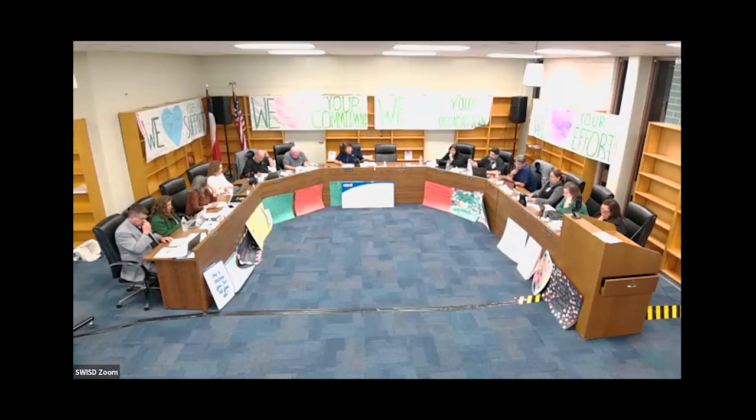Okay, consider approval of the GMP for package 1 for the Southwest Legacy High School additions and renovations project. The district had met with Joris and Pfluger Architects to get a site package 1 done. And so based on the subcontractor's bids for the CDs for package 1, we're asking the board to approve the guaranteed maximum price for package 1 of Southwest Legacy High School addition project not to exceed $892,644, and then allow the district to negotiate the terms and conditions of the GMP.